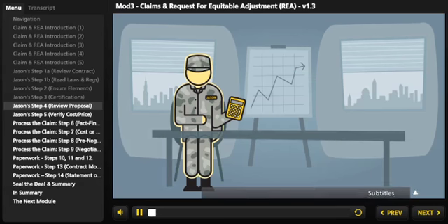Fourth, Jason reviews the proposal to make sure it's complete and that all the costs and prices are included and calculated correctly. Jason checks to make sure all elements of the proposal are present, including company name, clear descriptions of any changed work, and any other work elements affected by the work effort being claimed.